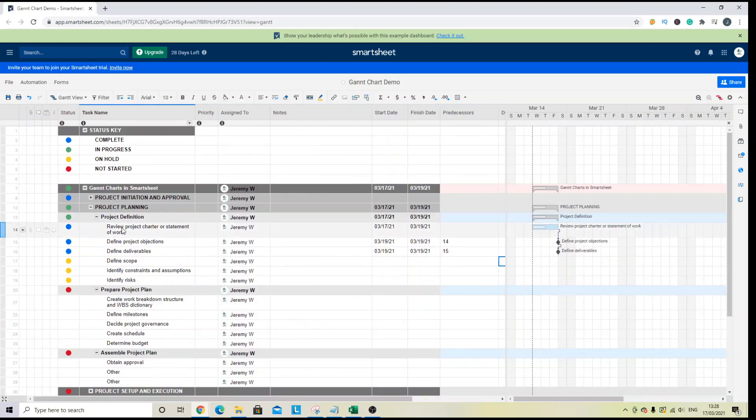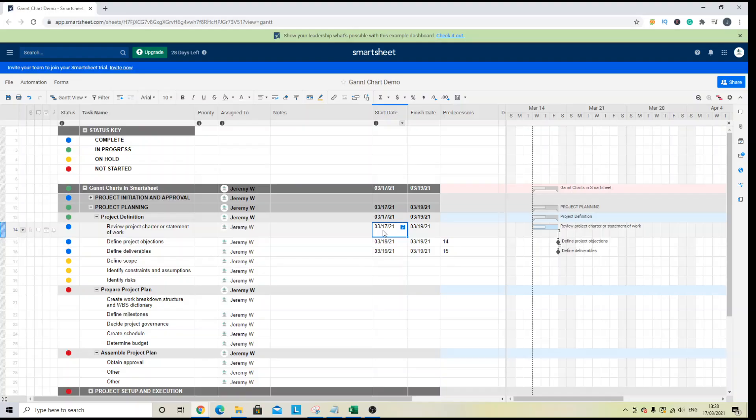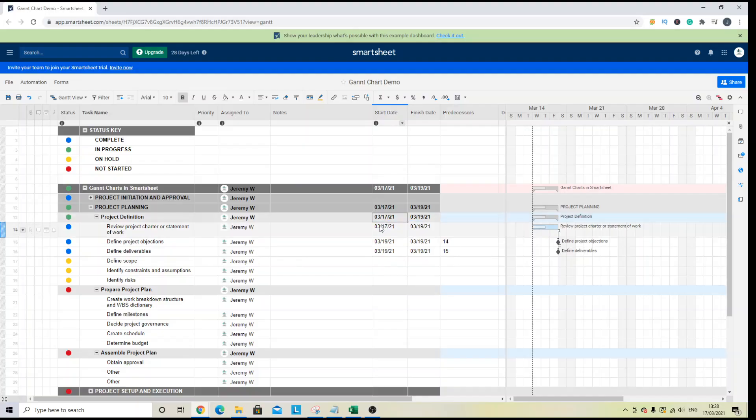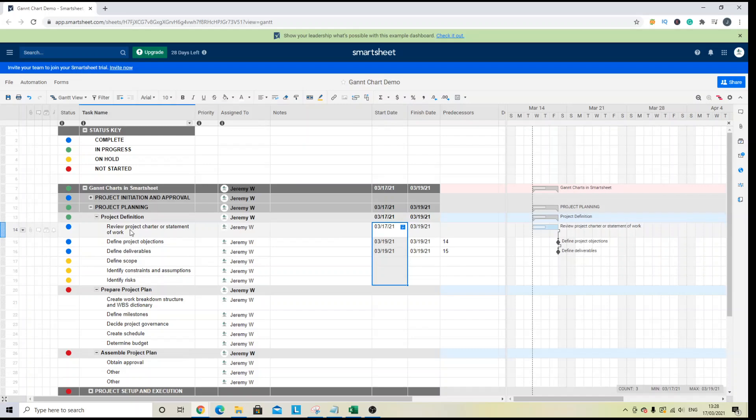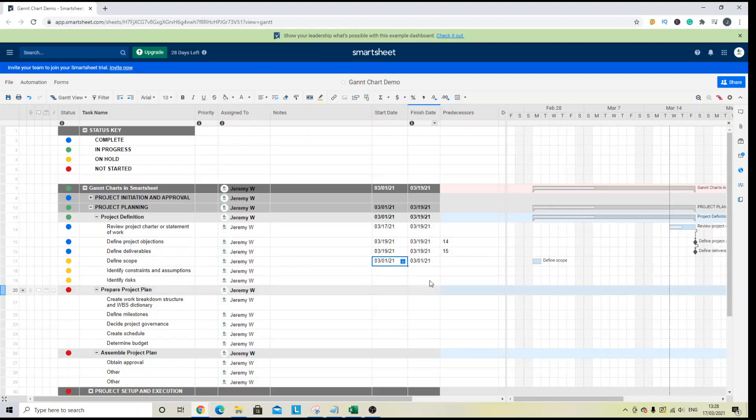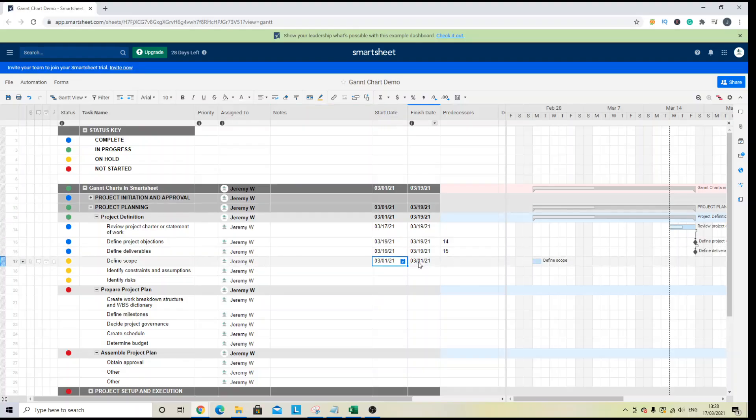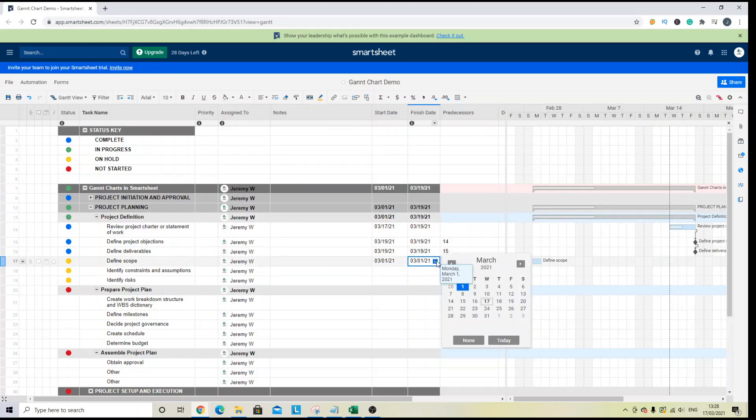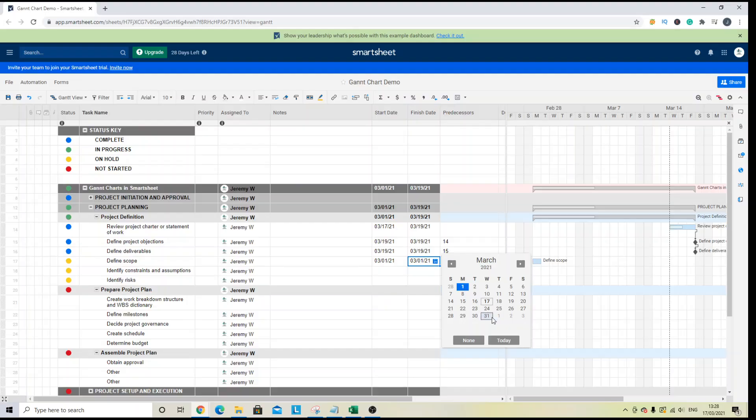Now, back to the parent child relationship, the subtask will always roll up. So you'll see here that the start date, it will look for the first start dates it can find within the column and of the child tasks. So if I was to put in something earlier than the 17th, that will update here. At the same time,